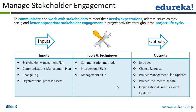After planning, you actually manage stakeholder engagement. The tools and techniques are communication methods, interpersonal skills, and management skills. Outputs include the issue log, change requests, project management plan updates, document updates, and OPA updates. The objective is to communicate and work with stakeholders to meet their needs and expectations, address issues as they occur, and foster appropriate stakeholder engagement throughout the project lifecycle.